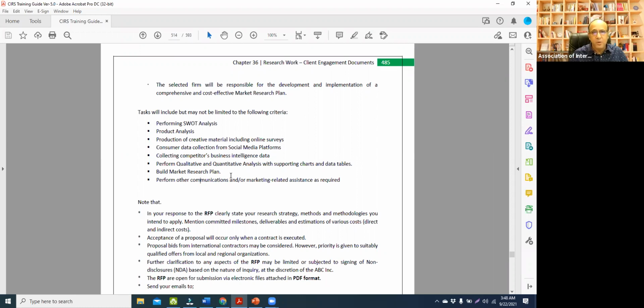That could be cost plus 20%, a cost plus contract, a mix of fixed plus cost plus, or those variances can be accommodated in increased pricing if you're not able to deliver within the specified time. So all that has to be built into a contract.